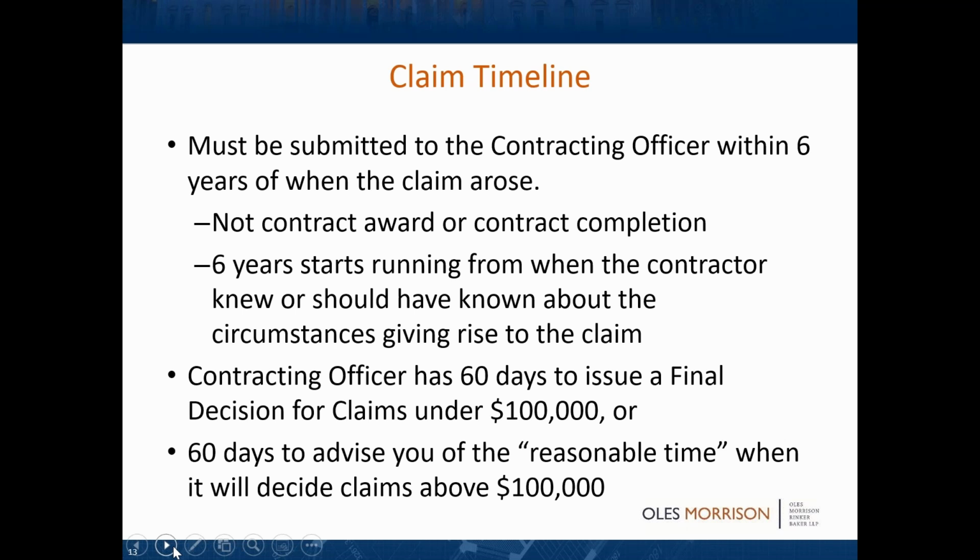You want to submit your claim as soon as possible. You want to try to submit an REA and settle it and get your attorney's fees and consultant, but you don't want to dicker around too long in negotiating, because it's not from when basically the negotiations break down. It's from when you knew or should have known that you had a claim. And it doesn't even go back to when you started to incur damages. The case law talks about when you essentially had a harm.